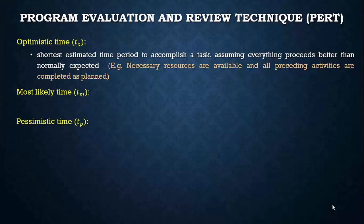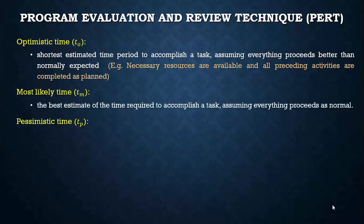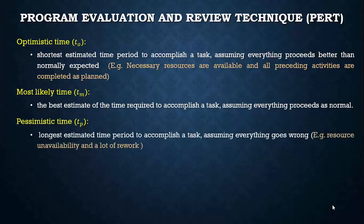Most likely time is the best estimate of the time required to accomplish a task, assuming everything proceeds as normal. Pessimistic time is the longest estimated time period to accomplish a task, assuming everything goes wrong — meaning resource unavailability and a lot of rework needed for individual activities.